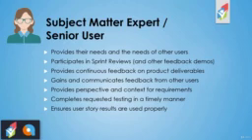Two other things that the subject matter expert or senior user can help with. Number one is if they're requested to do any testing, just to make sure they do it in a timely manner. Sprints are not long, and what happens sometimes is the subject matter expert or that senior user will be asked to test. They'll wait till almost the end of the sprint to test it, then they find an issue, and the team has very little time, if any time, to complete that fix or the change that's needed. That SME or senior user needs to be available pretty quickly to help do testing and get it completed in a timely manner so the team has the necessary time to make adjustments should they be needed.